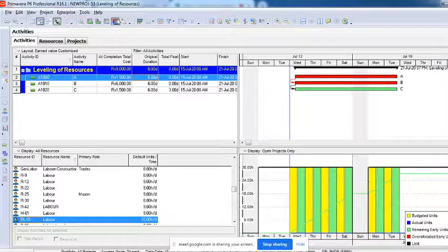Similarly, the cash flow is prepared. You understand the cash flow, right? Earlier I was prepared for 4 people's salary on Wednesday, 4 people's salary on Thursday, 4 of them on Friday. Now it has changed. The cash flow is completely changed, because we are not committing for 4, we are committing only for 3. We are planning it for 3. The cash flow will also change.